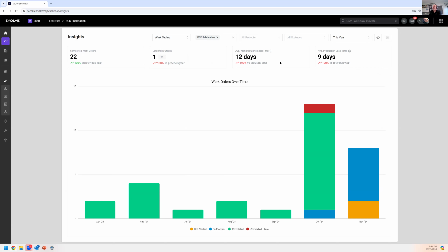Now, there's a difference here in the production lead time because the production time is actual when a task is started and production is complete. So here there's a 3 day difference. The difference is the processing of the shop, order materials, waiting for materials, wait times in the work cells. Maybe you're waiting, whatever that is, that's the difference in those 3 days. So really, our production time for anything is averaging 9 days, and we have a 3 day wait for some reason, whether it's material, information, tools, equipment, whatever. That's the reason why these two are different.